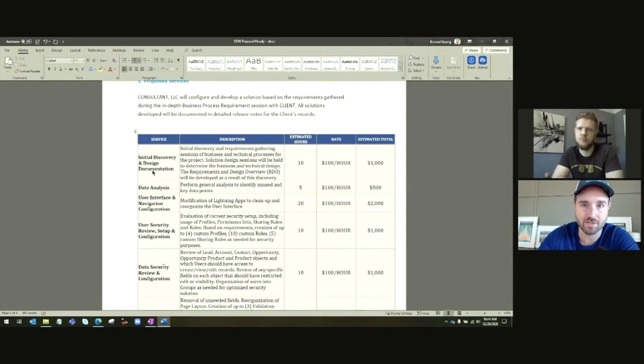Like, guys, I've already spent 12 hours on initial discovery and design documentation. I ate a couple of the hours for you because we went over and I know it was out of your control, but we can't go to 15 or 20 on a 10-hour line item. So we either have to add more hours or we have to take hours from a different line item in order to facilitate this process, right?